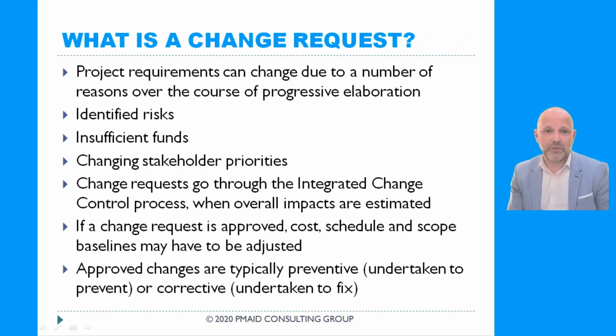So what is a change request? Project requirements can change due to a number of reasons over the course of progressive elaboration. Could be the risks that we identify, could be insufficient funds, could be insufficient time, could be stakeholder priorities that are changing. All of a sudden there is a new requirement. Change requests go through the integrated change control process when the overall impacts are estimated.